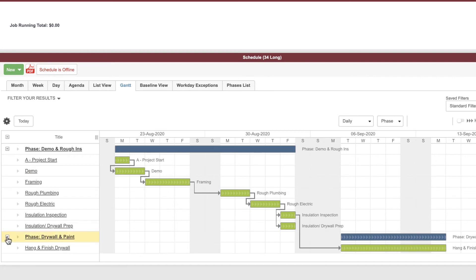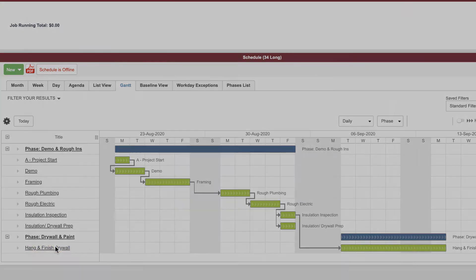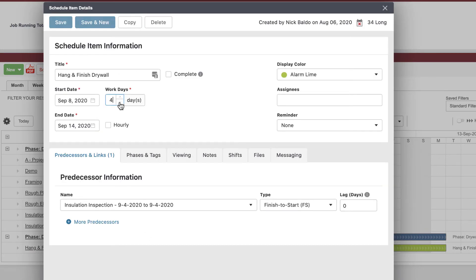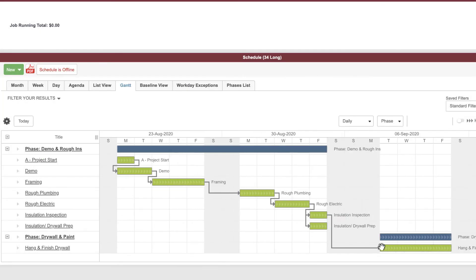Another phase popped up. If I hit the plus button, I'm into hang and finish drywall — so we're now two weeks in and into drywall. What happens if the insulation inspector doesn't show up on that Friday? That's the beauty of dependencies. Also notice Monday is grayed out — that's a non-working day because it's Labor Day, and I've established in my system that Monday is non-working. This is super valuable — it automatically knows that. I might change drywall duration to four days since they may not work on Labor Day.